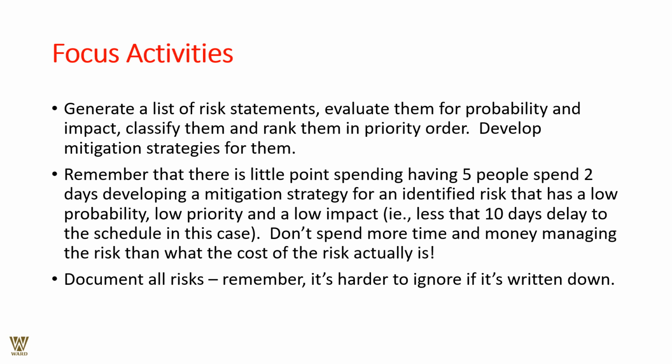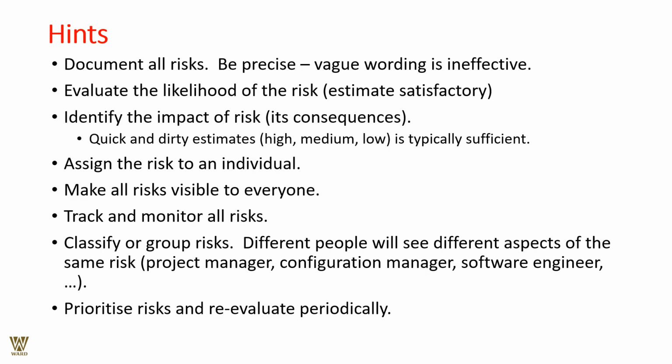Do not spend more time. Do not even spend any money managing the risk when the cost of managing the risk is more than the cost of the risk actually is. Document all risk. Remember, it is harder to ignore if it is written down. I'll give you hints: document every risk, be precise. Vague wording is as ineffective as it can be.